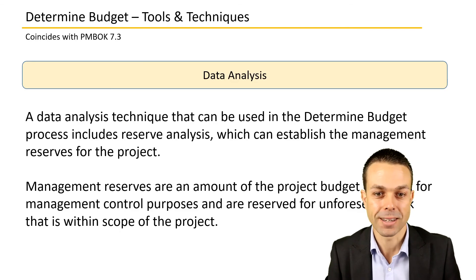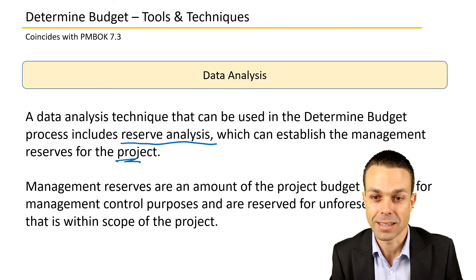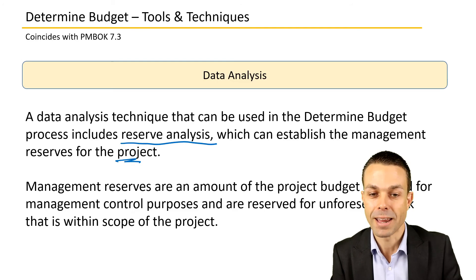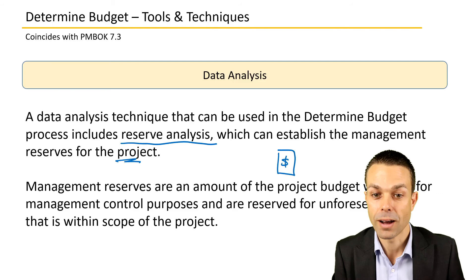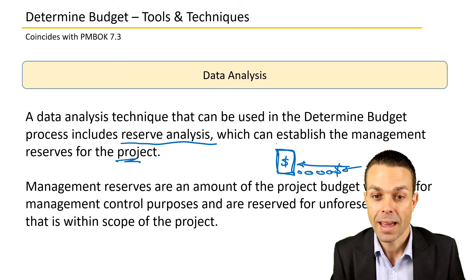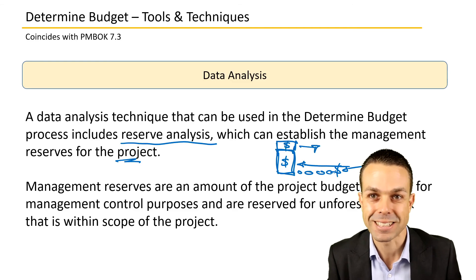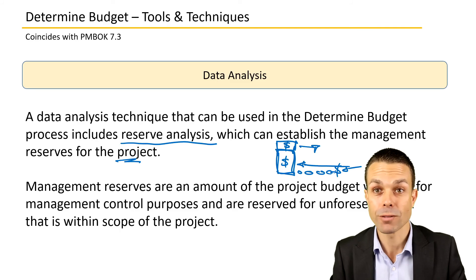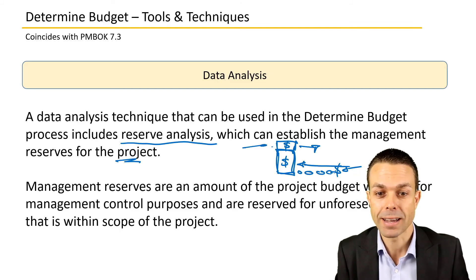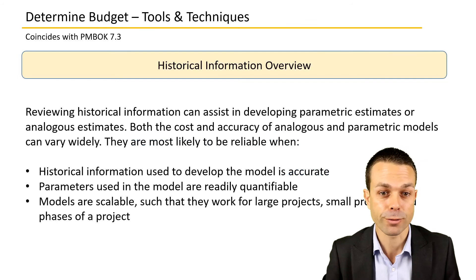Data analysis is also a tool and technique, and it can include reserve analysis, which establishes management reserves for the project. Management reserves are an amount of project budget additional to the cost baseline — once all work packages are estimated and aggregated into the cost baseline, we add a little extra on top. That is our management reserve, reserved for unforeseen risks that might come up — things we just have not thought of — so we have a little bit extra to use toward any of those risks.